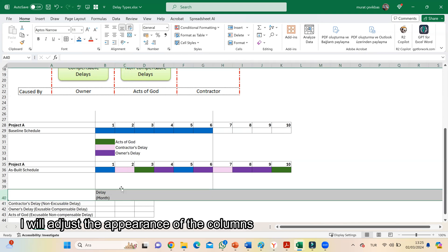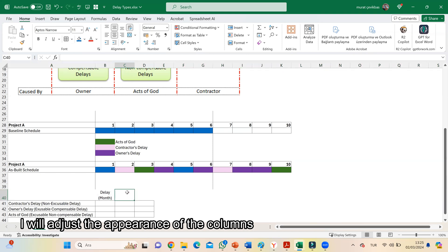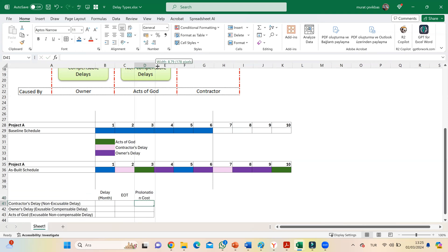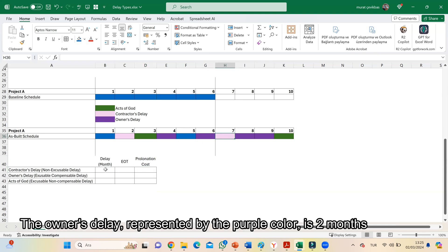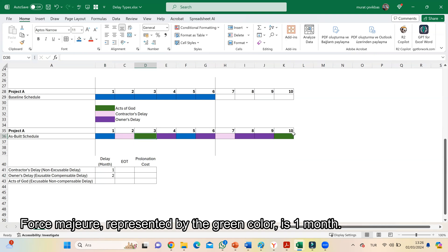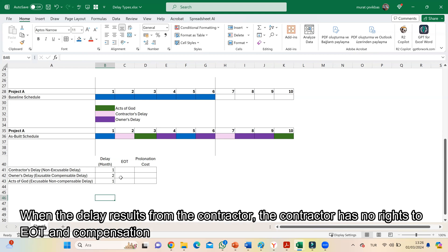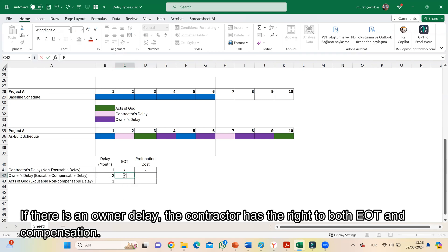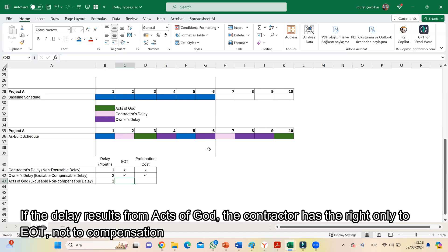I will adjust the appearance of the columns. This is the EOT column and this is the Prolongation column. The owner delay represented by the purple color is 2 months. Force majeure represented by the green color is 1 month. When delay results from the contractor, the contractor has no right to EOT or compensation. If there is an owner delay, the contractor has the right to both EOT and compensation. If the delay results from force majeure, the contractor has the right only to EOT and not compensation.